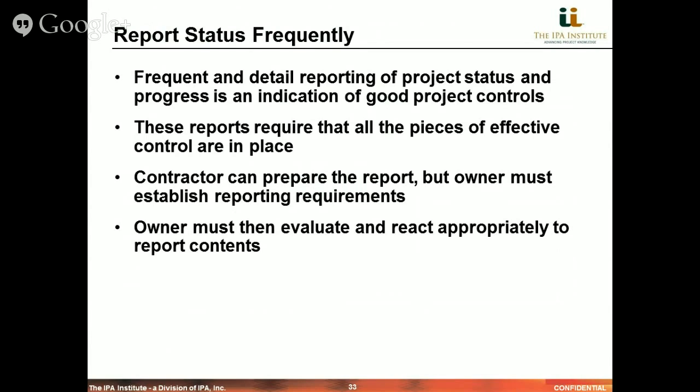And these reports require that all the pieces of a control system are in place. So it needs to have been estimated for control. There needs to be a physical progressing mechanism in place, good schedules at the beginning that serve as a basis for schedule control and forecasting.